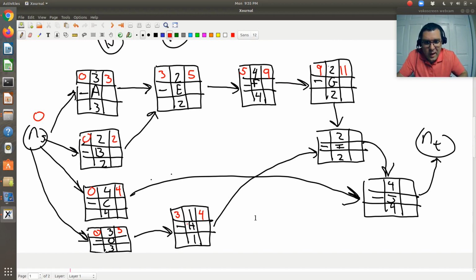So now when I look at I, okay, I has a precedence of both G and H. So I'm going to look at the earliest possible finishing times for all precedents, which in this case is G and H, and the maximum value is going to be my earliest possible starting time. So when I look at G, its earliest possible finishing time is 11. H, its earliest possible finishing time is 4. So the earliest possible starting time of I is 11, has a duration of 2, so its earliest possible finishing time is 13.